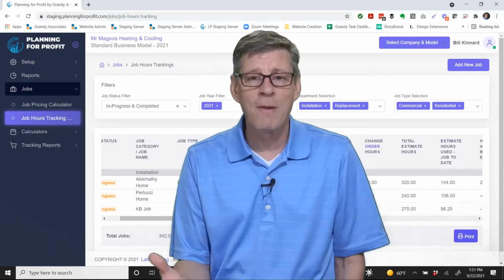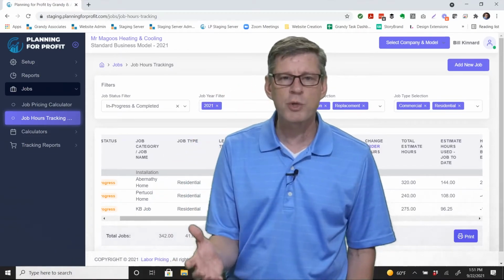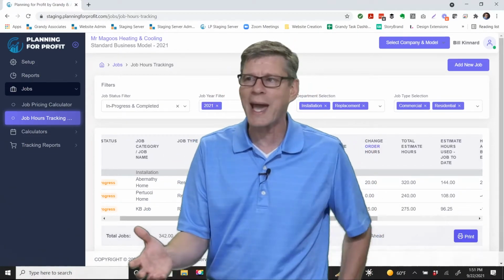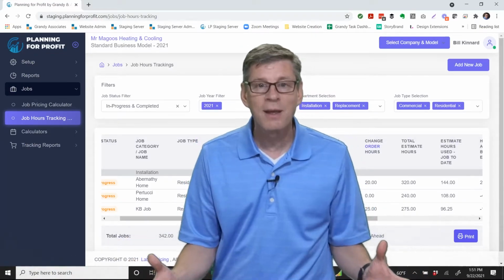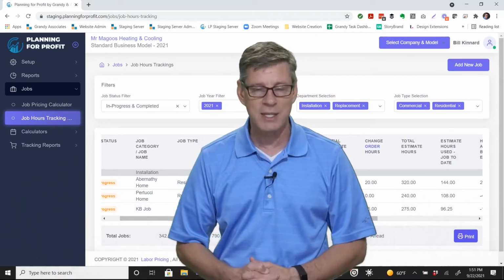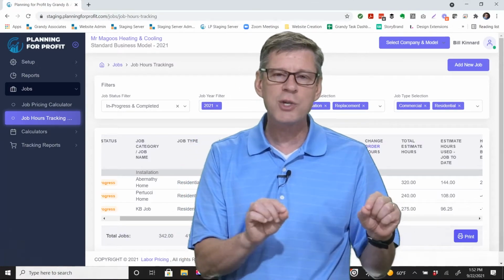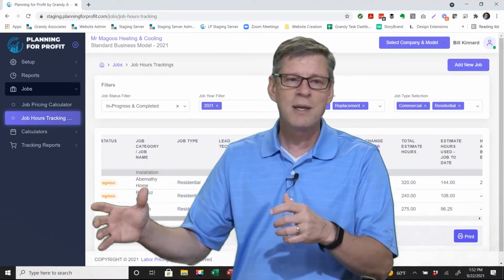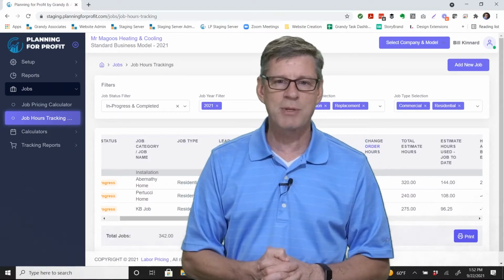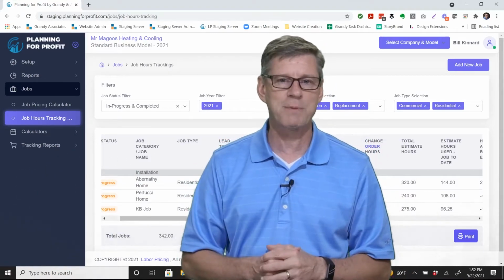Because it's awful. They didn't tell us we were going to have to core through a 24-inch fieldstone wall when we got out there. We didn't plan for that. That took us a whole bunch of time that we didn't anticipate, right? And so what will end up happening is, if indeed you have estimate issues, it will start to correct the estimate issues that you have on the job itself. So you need to be working with your estimators in that particular case.